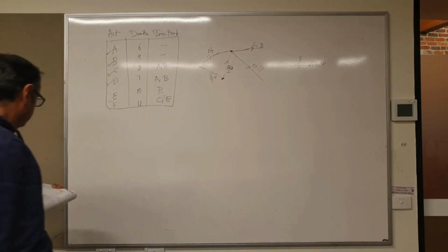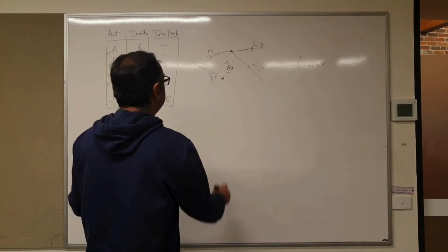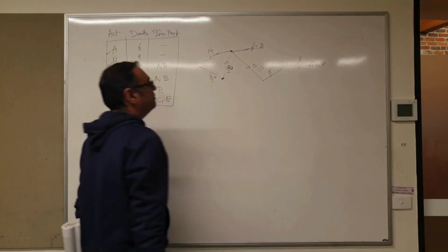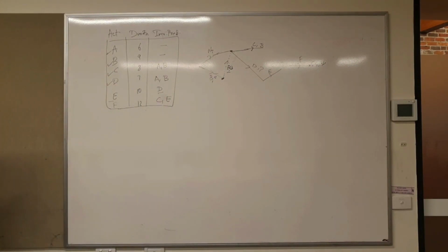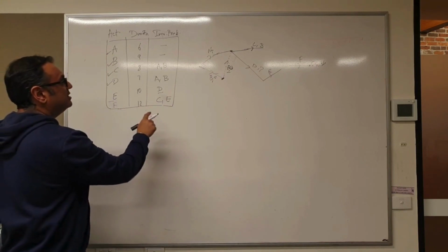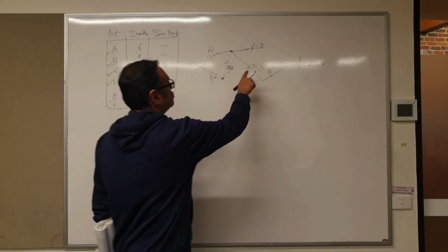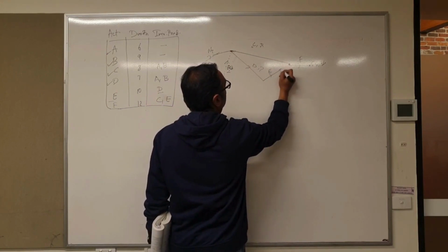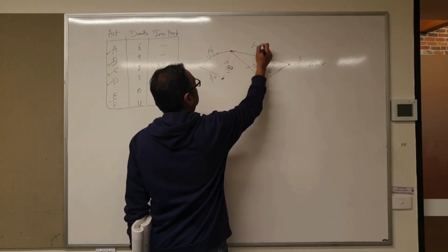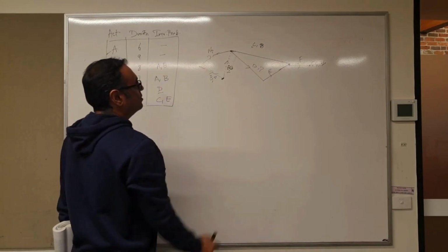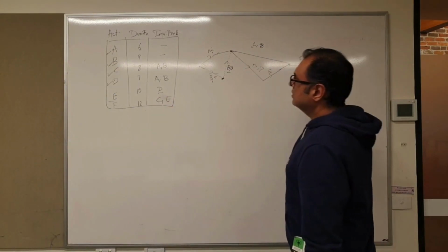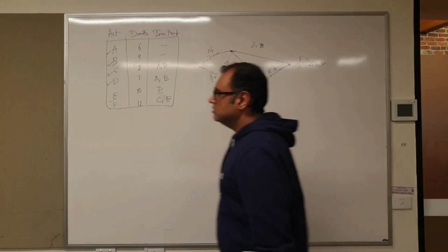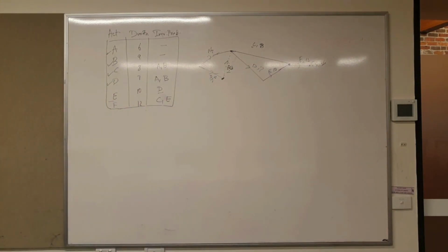Now you need a D that needs a E. So basically D that needs a E. And then E needs C and F. So probably, and F is how much? 12. E is 10. So that makes your activity diagram complete.